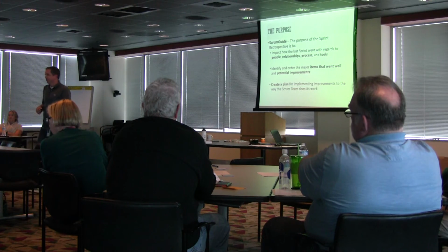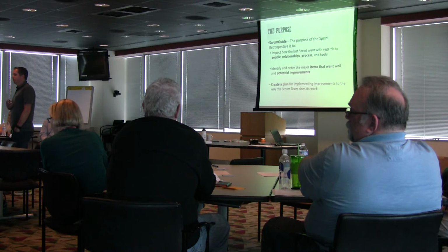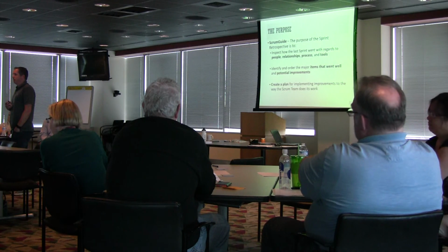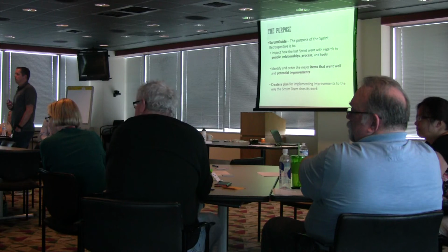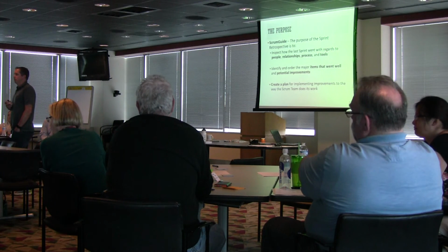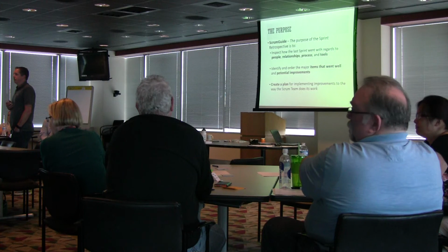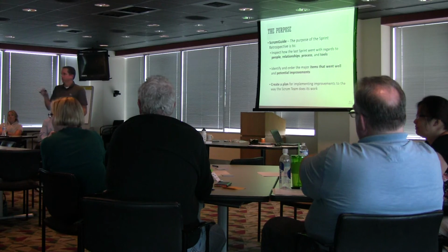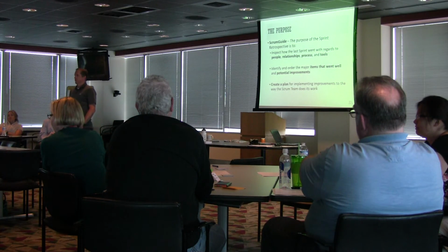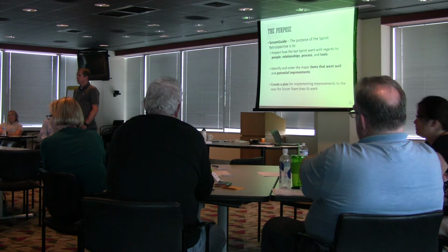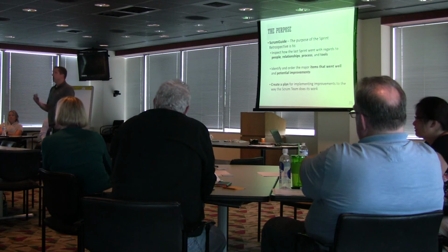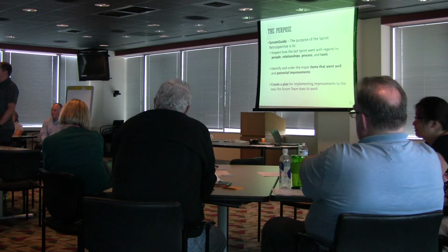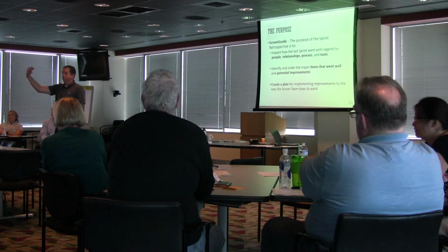Because you can just write up 10 actions when we leave and then out the door, and then we get to the next one, write up 10 more actions, and no one's held accountable. And it's the same cycle over and over again. If we don't start saying, okay, here are our top 5 things we want to improve, who is taking action on these top 2 as a team? Not just because you wrote it up there, you're accountable. I'm only making the point to be careful that, I don't think that's right. Whoever writes it or says it should not automatically be accountable. I think it should be a discussion, but if you don't do that when you leave, I feel like you just keep writing the same things each time you leave. Give it a try. And then again, if you give a process owner or an owner of this improvement, they don't necessarily do all the work.